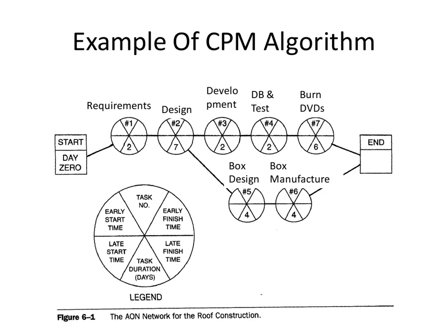Yeah. So yes, you can have multiple critical paths in principle. There are cases where it occurs, but it's based on this race condition, as it were, that this path and that path will finish at exactly the same time. And normally, just because of the vagaries, the uncertainties associated with things, it doesn't happen that way. But what's much more common is you get a shifting critical path because things turn out differently than you thought. Or it turns out there's a dependency between things you didn't anticipate because node 6 ends up needing something from node 3 or something like that.